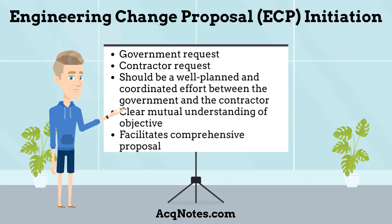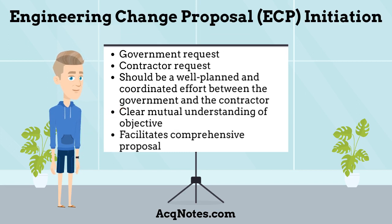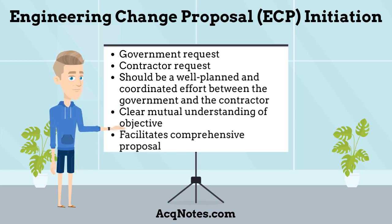How is an Engineering Change Proposal initiated? The initiation of an ECP begins at the government's request unless it's an unsolicited ECP from a contractor. Since most ECPs occur in a sole-source environment, the initiation of an ECP should be a well-planned and coordinated effort between the government and the contractor.